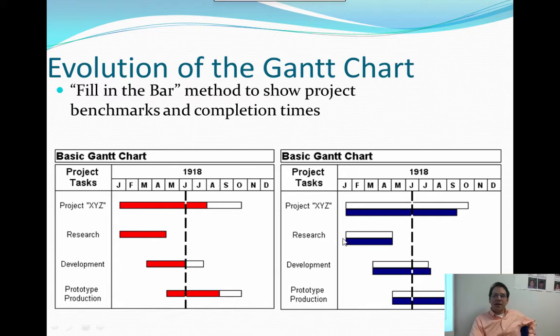And then these Gantt charts are a little bit more complex in that it shows me the task and what percentage of the task is already complete. So this task here is normally going to take, looks like about 10 months. Right now we're in June, but this red portion shows the amount of the task that's already complete. So that's maybe 70, 80% of the task is already complete. So it's ahead? Yes, I'm actually ahead of schedule on this task here.